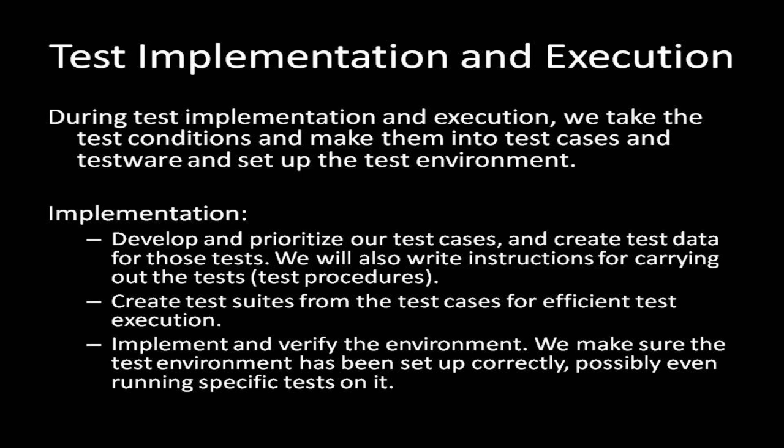Test implementation and execution have the following major tasks, in approximately the following order. Implementation. Develop and prioritize our test cases, and create test data for those tests. We will also write instructions for carrying out the tests, test procedures. Create test suites from the test cases for efficient test execution. A test suite is a logical collection of test cases which naturally work together. Test suites often share data and a common high-level set of objectives. We'll also set up a test execution schedule.